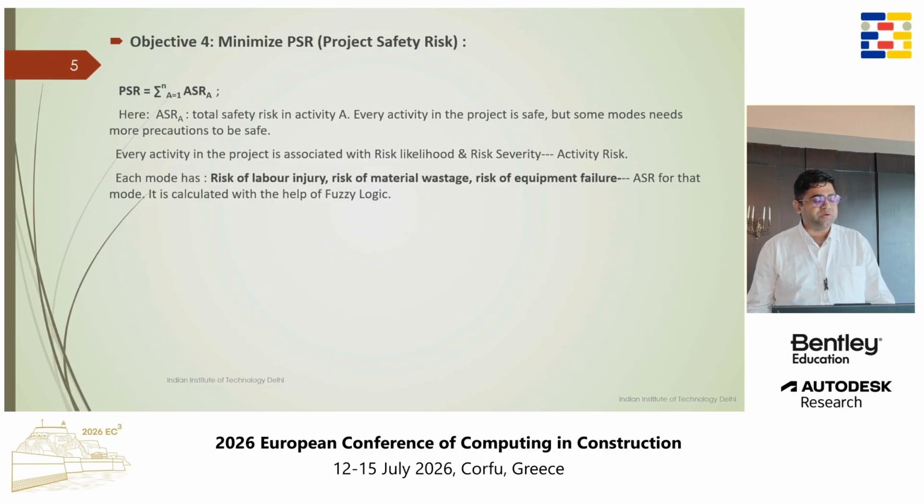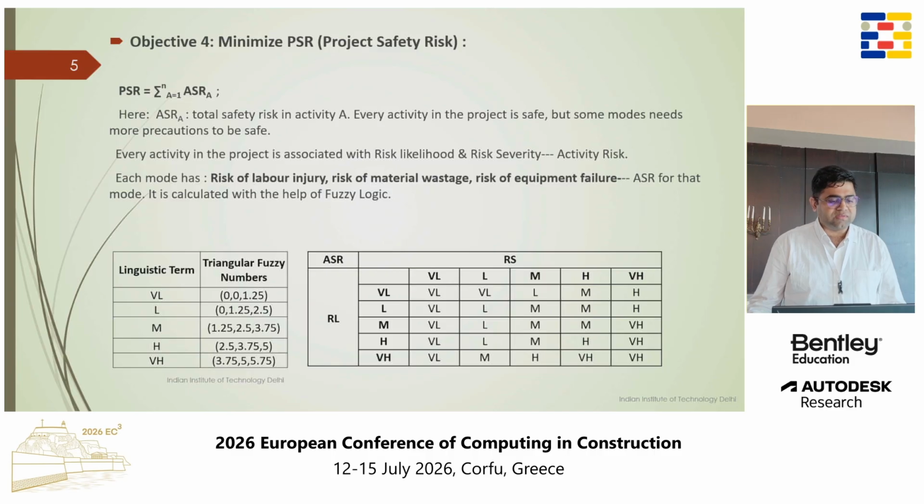Then we need to minimize the safety risk. We want the project to be safe, but every mode of the activity may not be equally safe. There may be a higher safety risk in some modes, and some modes may have a little lesser safety risk. So we are defining safety risk using fuzzy logic, where we define the risk of severity using fuzzy numbers, and an illustration has been given of how this has been done.